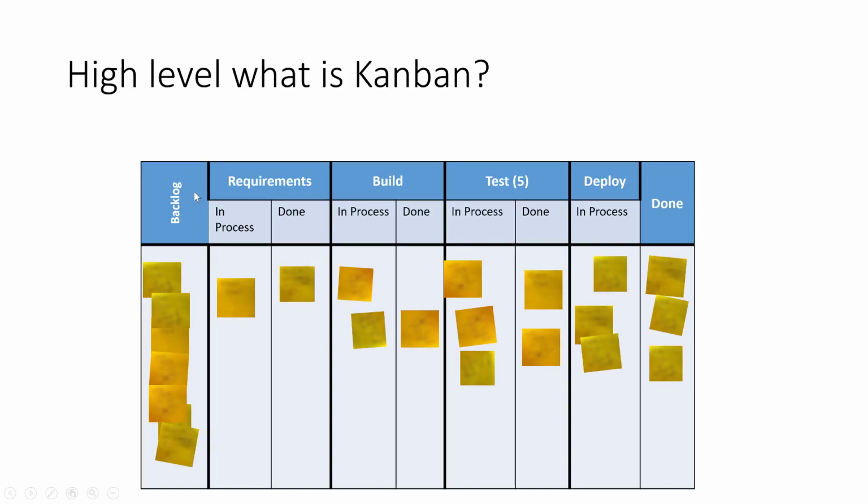That column would actually be refined stories. So you'd have a backlog of a mishmash, then you'd have a column that is refined stories, then you'd have a column that is stories approved, maybe, I don't know, and then you would have it go into requirements, build, test, deploy. Right? So it just wants to mirror what you're doing right now, and then you start using it as a tool.